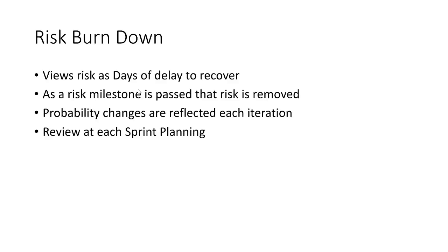Pretty simple. It views your risk in days to recover. So if a risk were to occur, how long would it take us to get back on track? Which is a great way of looking at it. It's a very innovative perspective on risks.